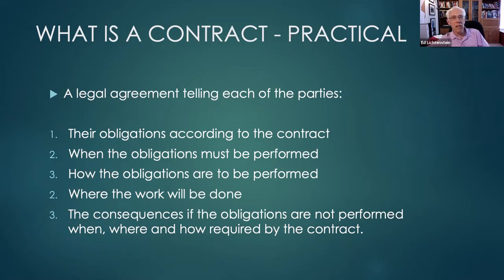It is, if you have signed a contract which says when the performance will be performed, you should be there at that time. Particularly when it says something like time is of the essence. Usually you may get some wiggle room if you just describe a delivery time or a performance time. If the contract says time is of the essence, then time is a critical element of that contract, and you need to follow it. You can be in breach if you don't match the time.